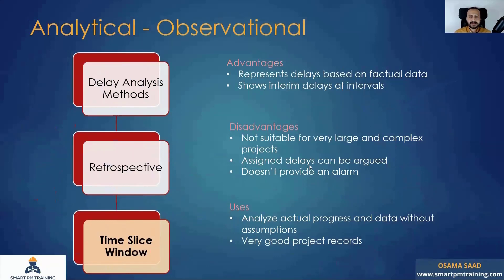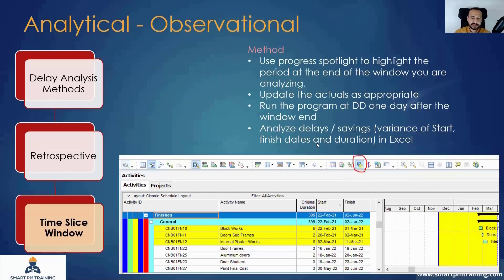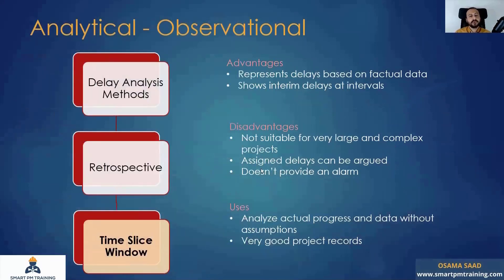It is not recommended for complex large projects. Assigned delays can be argued unless you have very good project records — if you assign three days to the employer and two to the contractor, you need solid proof. Also, it doesn't provide an alarm, because you're dealing with as-built information based on actual data up to a certain date only. This is different from Time Impact Analysis, where you predict or forecast delays.